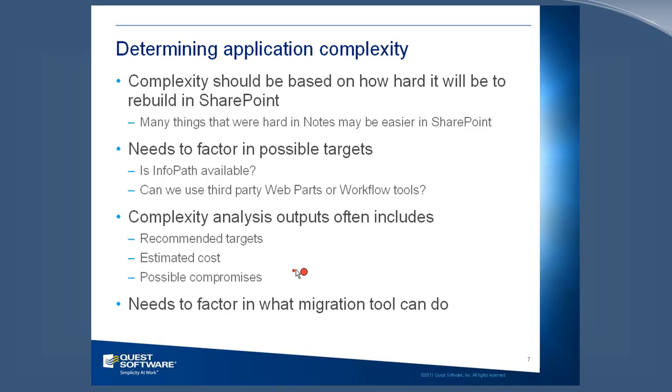We also allow you to track these things at the class level or the database level. So you could put an estimated cost for doing the design migration once for the template, and then you can have an incremental cost for doing the actual moving of data for every instance. If you have a template where 50 databases use the same template, there's going to be a one-time cost for migrating the design of the template, and then an incremental cost that you incur 50 times. And so our tool is good at kind of tracking all that and helping you.